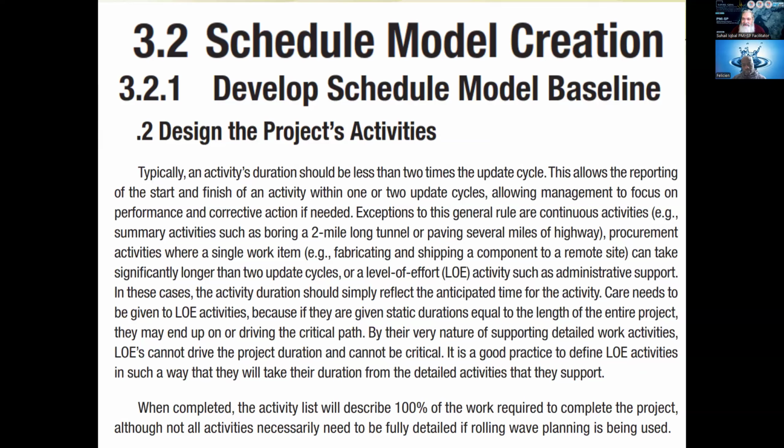No matter if it is really two updates long or a little shorter, if it crosses one update cycle, we will break it into two parts. The first week part would be the 50% progress, which will be by default given at the end of the first week. But the second part will only be given when the activity is complete.